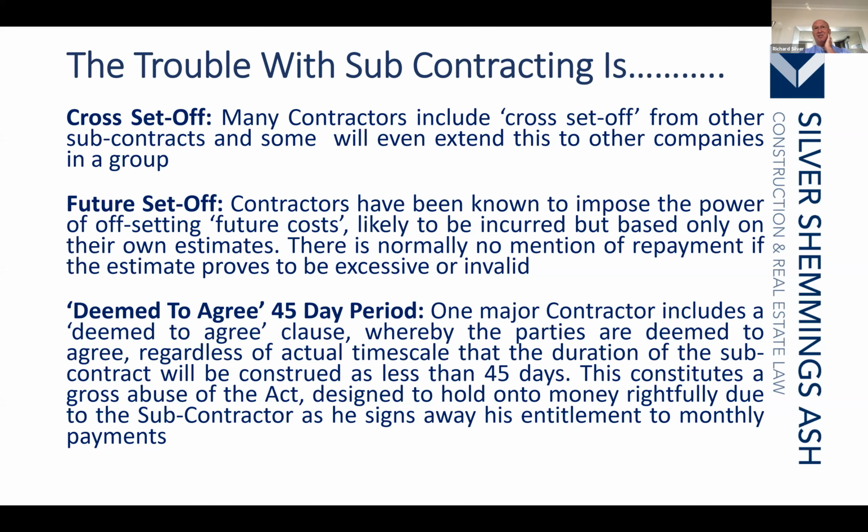Most people, particularly contractors caught in the middle, do not want to be found involved in adjudication which is between three parties. So where it involves the employer, it's irrelevant to the subcontract because the subcontractor just looks under the subcontract itself. So if the subcontractor says they're taking action against the main contractor for the failures of the employer, the main contractor becomes responsible for those employer's failures and the subcontractor would succeed. And then it's a decision for the main contractor whether they take the necessary action up the line against the employer.